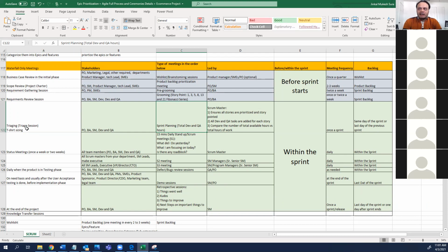And there will be number of hours associated. Like we had number of hours associated for story points. For every single story point, we said less than 8 hours, or 3 is less than 3 days or something like that, right? For one resource. So triaging is something similar. In waterfall environment, when they organize this meeting, as opposed to assigning story points, they assign t-shirt size, which is small, medium, large, extra large, XXL, and every company has their own estimates for this.